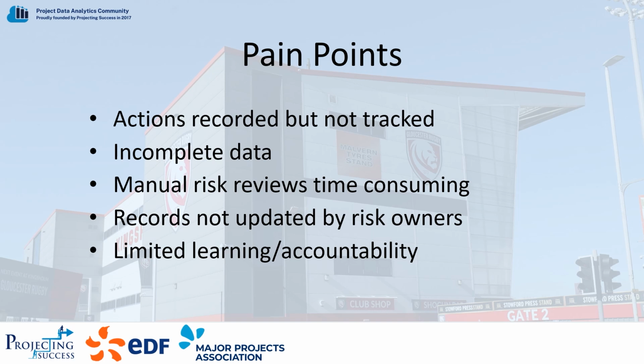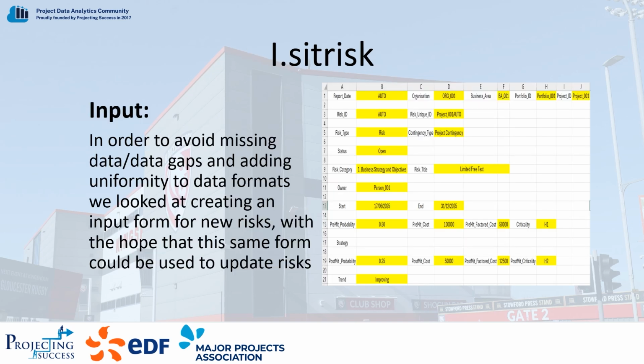In response to the incomplete and inconsistent data, we looked at creating an input form for each risk that could then be used to update the risk when prompted. This form used data validation to limit the responses to the number of fields, and beyond this we would look to only allow saving the form once the form was fully completed.